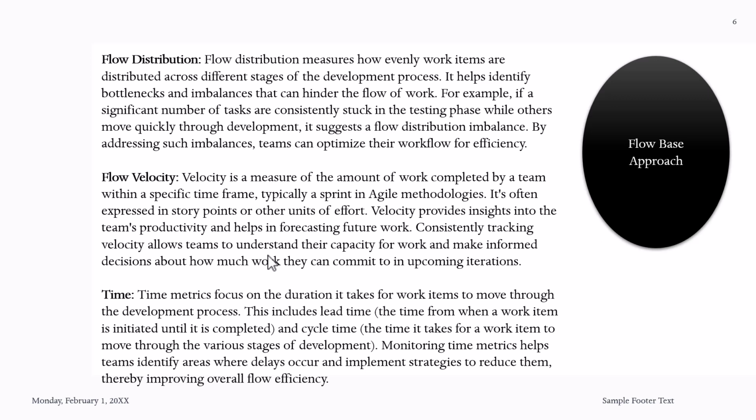For example, if you have an epic, sometimes it's not that straightforward to come up with an idea of how we're going to finish or when this epic is going to complete. But looking at the velocity of the team, especially from previous history, you can see how the team has been able to finish some work, and then using that flow velocity, you can determine the future work.